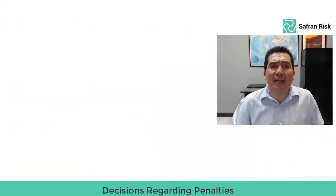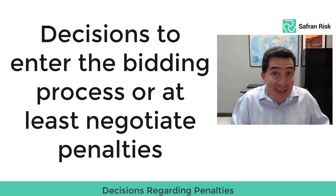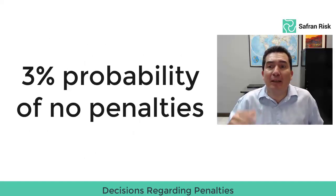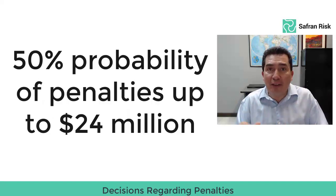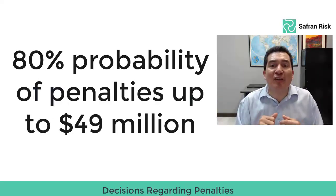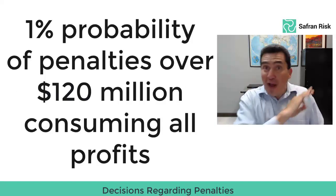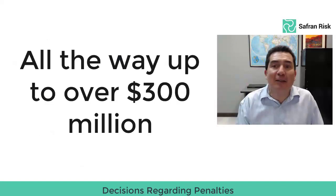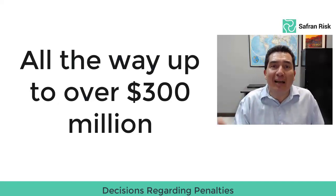With these elements in mind, directors can take a look at the decision to enter the bidding process, or at least try to negotiate penalty clauses. There's only a 3% probability that there will be no penalties; a 50% probability of penalties up to $24 million; an 80% probability of penalties up to $49 million; and a 1% probability of penalties over $120 million — expected total revenue — all the way up to an extreme position of over $300 million in penalties.